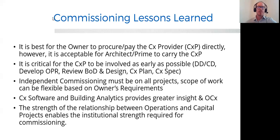Thank you. No, I think that's perfect, and I will jump in on a couple things there. So also on the closeout side, we also put together a systems manual, which is obviously a very key document for operations to understand and have a narrative on how things actually function. There's intent, and then of course, as things change or as sequences or overall intent changes, even albeit minor, having that systems manual for operations is obviously a very important document.